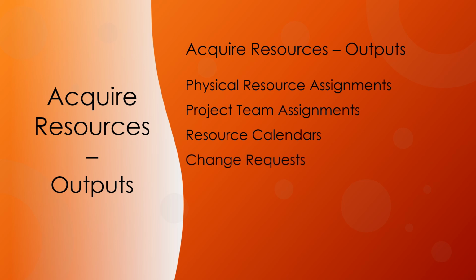When changes occur as a result of carrying out the Acquire Resources process, for example, impacts to the schedule, or when recommended corrective or preventive actions impact any of the components of the project management plan or project documents, the project manager needs to submit a change request. Change requests are processed for review and disposition through the Perform Integrated Change Control process. Any change to the project management plan goes through the organization's change control process via change request.